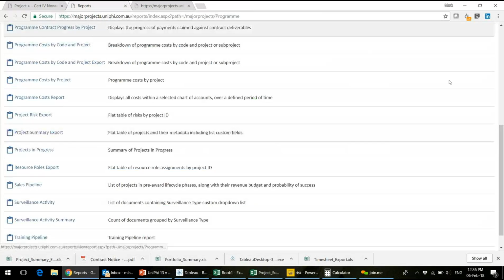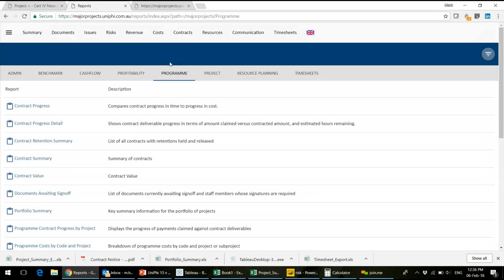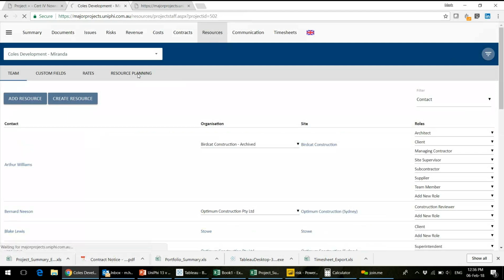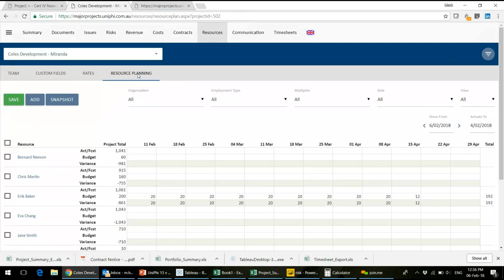3 more things to show you very quickly. We have redone our resource planning function, so it's completely new, completely different, in our attempt to simplify it. So now it is literally, on this project, these people are working, and we expect them to be doing 20 hours a week. These are weekly periods through that period, and you can set up bulk updates of that information through the add-in, but it's something to explore probably outside of the realm of this presentation, but just be aware that there's a completely new resource planning interface to utilize.